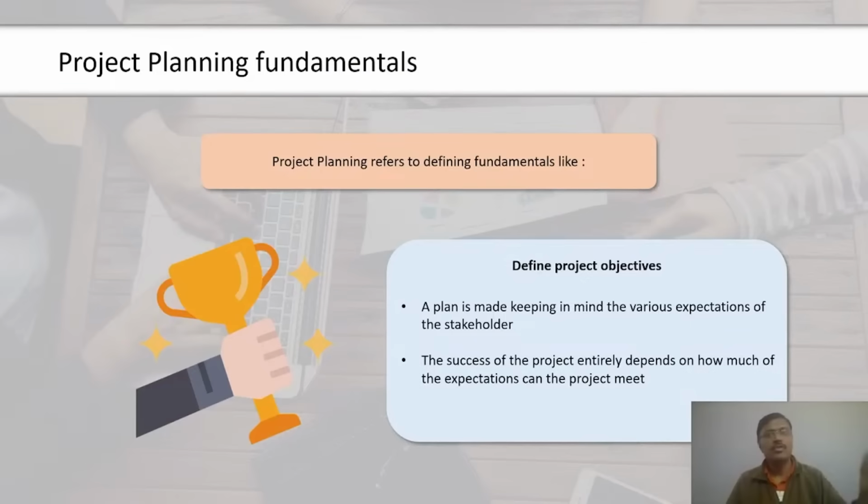The status of the project at the end of month 3 is summarized in the table. Requirements definition is completed and actual spending on this is $10,000. Architecture and design is done, and actual spending on this is $12,000. Development and unit testing is only 50% done, though it was supposed to be completed by 3rd month. It has cost $9,000 until date. System testing and go live has not yet started.